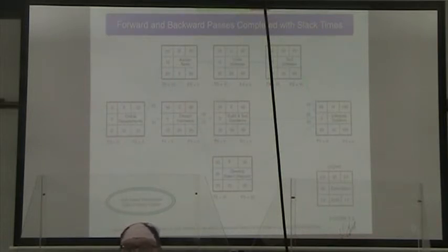We know this is the critical path, so we're going to make sure that we've got people working on that all the time. But we may be able to start some activities a little bit later when we can free up some people from the critical path work packages.